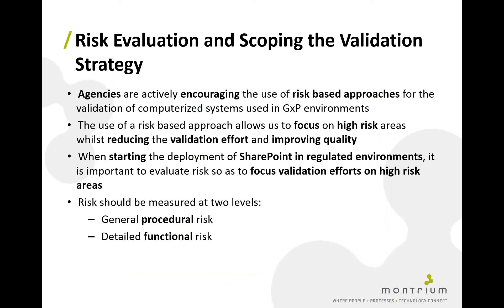When deploying SharePoint for regulated environments, it's very important to evaluate risk so we can focus efforts on high-risk areas. Risk would be measured at two levels. First, a general procedural risk — asking what we're using this application for, what processes we're governing with it, and whether those processes are regulated. From there we identify the different functions being used within those processes and perform a more detailed functional risk assessment on the functions identified.